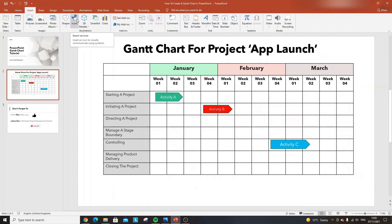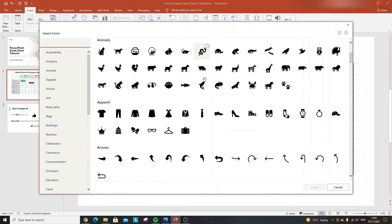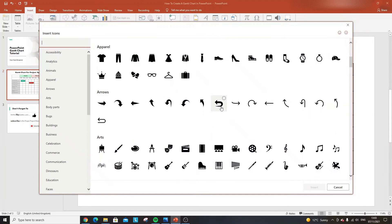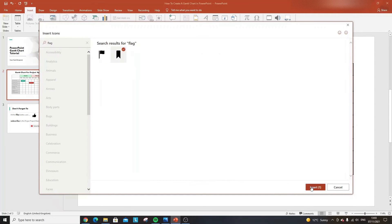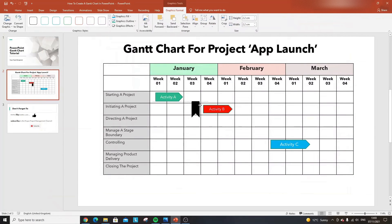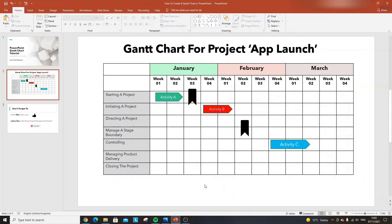You'll also want to add milestones to your Gantt chart, and you can use icons for that. Go to Insert > Icons and search for 'flag' — a flag icon works well. Place it at the relevant point, for example where a report or deliverable from Activity A needs to be produced in week three. Milestones can also mark boundaries between different phases of your project.